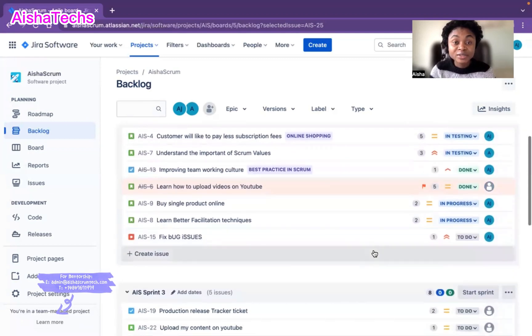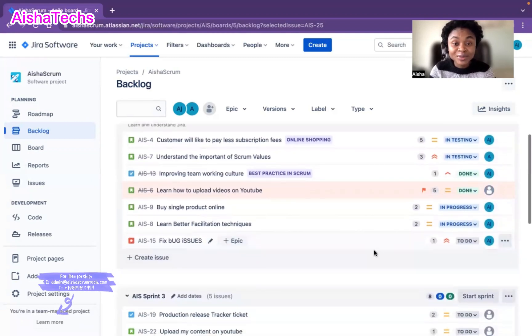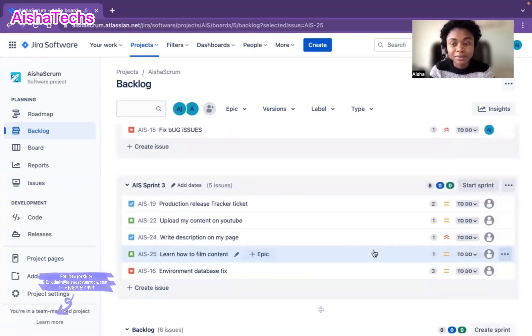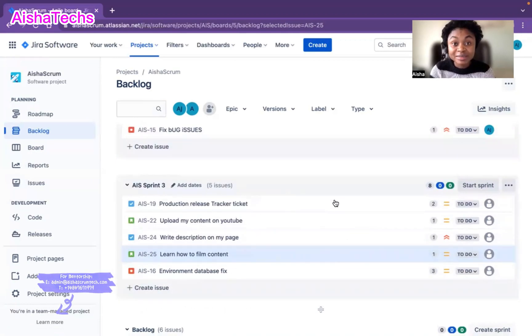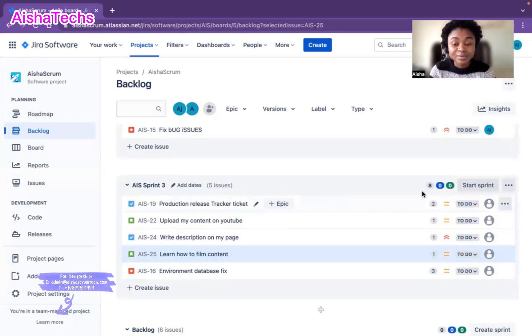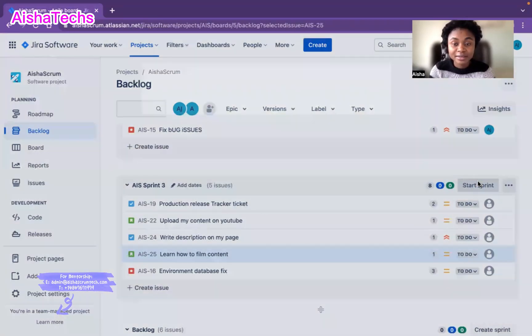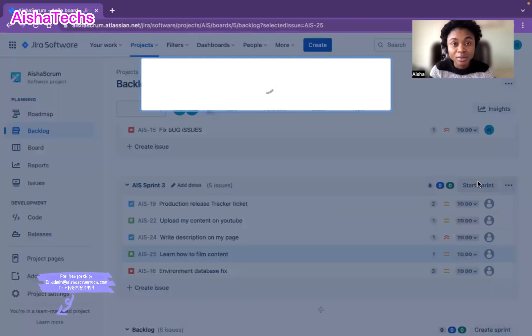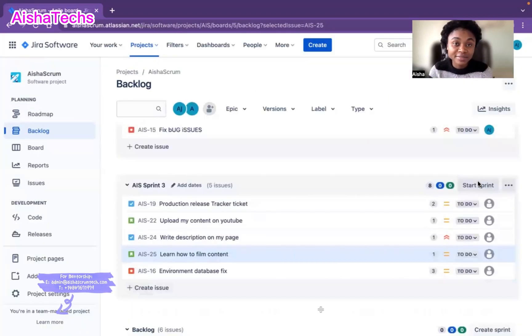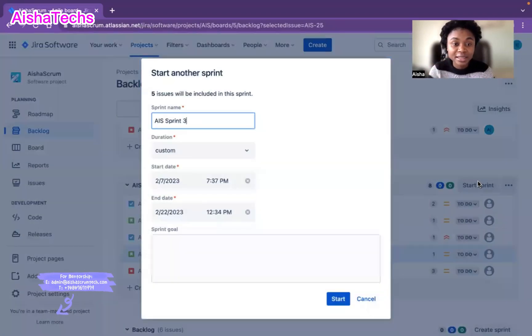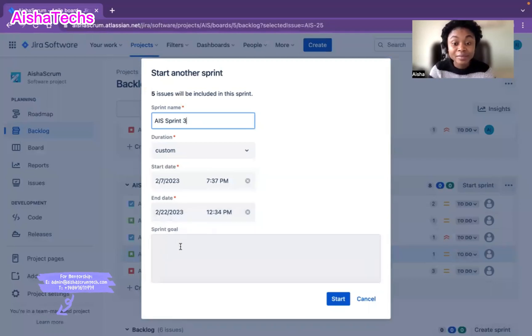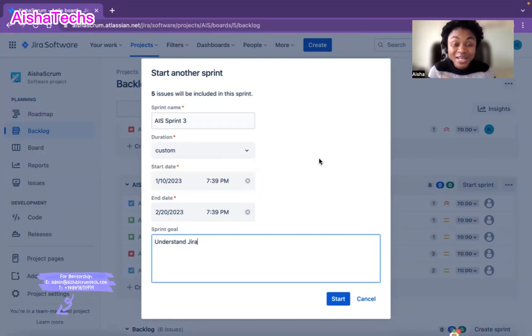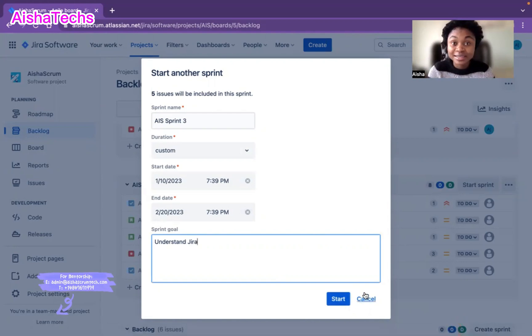Another way to add a sprint score is when you're about to start the sprint. See the next sprint backlog I have—it's saying 'start the sprint.' Before you start the sprint, if you click on the start sprint button, JIRA will load up the whole sprint. It gives you the dates, the sprint name, and everything. At the bottom, you just type the goal. After you type the goal and your team has had the discussion and agreed on it, you just hit start.